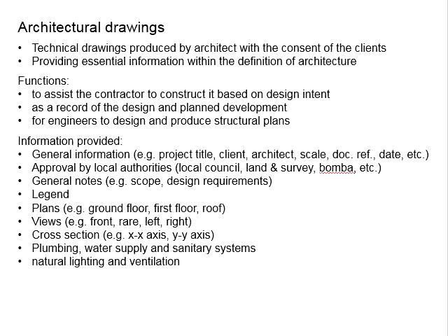In the local industry, when the project manager needs to monitor the progress of the project, it is normally defined by the percentage of completion, which is normally defined on the basis of the architectural drawings. How much area has already been completed, towards which stage of the construction, and it will serve as a record for the project manager to make suitable decisions in managing and planning the subsequent processes of the construction.